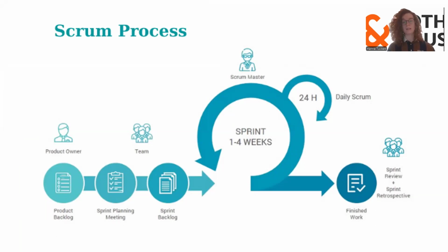What that means is the team and the product owner, in this case a manager, get together and decide what tasks they want to perform and what the priority of those tasks is. And this is very important. When they start compiling a list, list item number one will be the first priority and has to get done first. Then there will be 2, 3, 4, etc. This sets out the priority order of what needs to be done during the sprint.